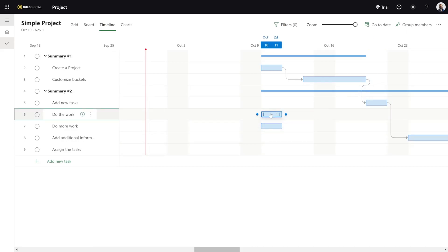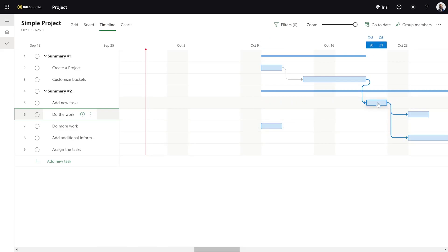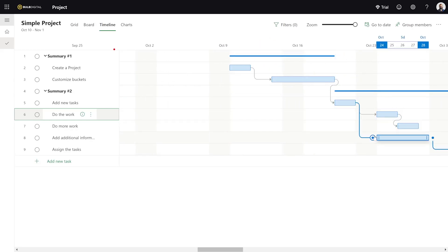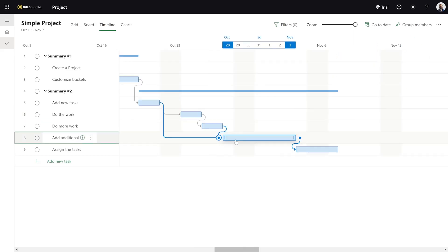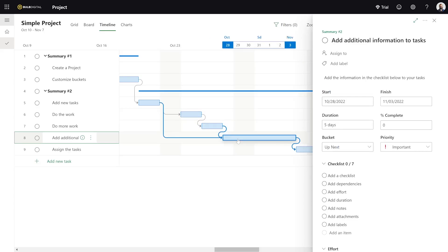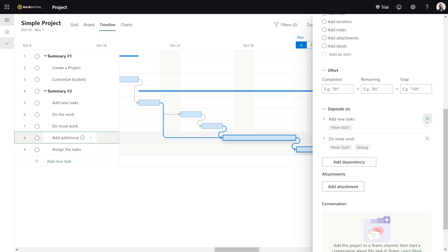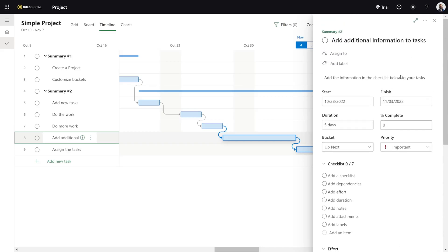To fix that, I can actually go to any one of these tasks, click on this little dot, and it automatically connects it to the task that it would come after. So I'm going to make this one come after that task, and change this one to come after this one. Now that I have my tasks with dependencies, I have an extra dependency here to remove — I can simply click on this task, scroll down to the dependencies, and remove that dependency. And now it's updated how I want.